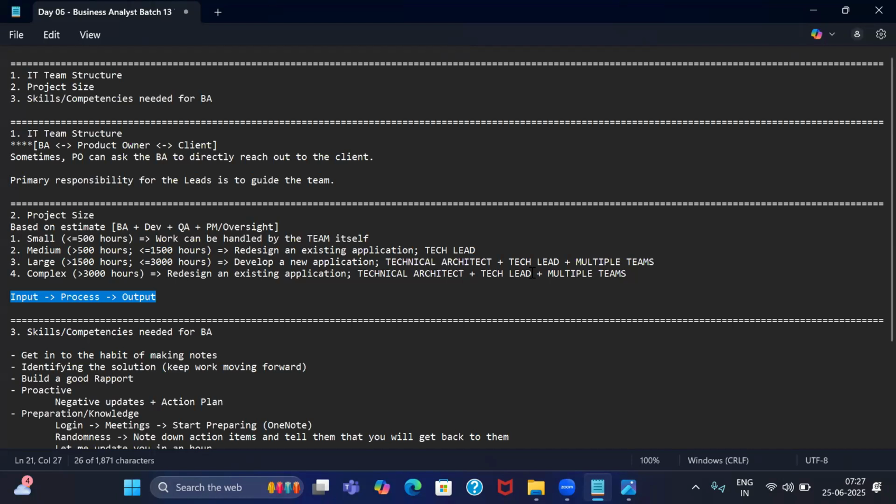Then they start coordinating with the product owner. The product owner tells that team A will give you the file. So now the BA starts reaching out to team A that please give me the file. We are dependent on you. If you don't give the file, our work is delayed. Okay. Team A will say that you never reached out to me before. We have not planned this work and for the next 1 month, so our work will start after 1 month.